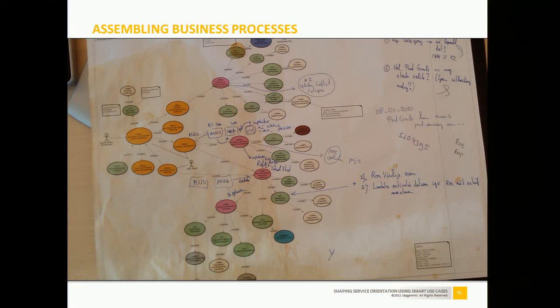The interesting thing about this particular process is that we implemented it in an Agile project. And we implemented a number of these processes in this Agile project. We originally had 8 iterations of 2 weeks. So after a few iterations, after 5 to 6 iterations, we knew what speed we were traveling at. Since we estimate this stuff in smart use case points, which will be the next and the last subject for this talk,